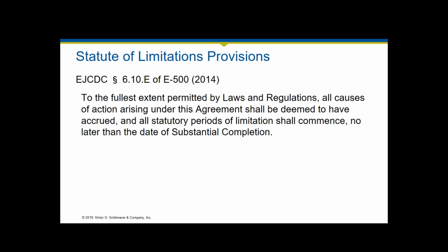Looking at both the AIA standard contract and the EJCDC documents, they have this type of provision. At least the AIA used to have it, the EJCDC still has it: all causes of action arising under this agreement shall be deemed to have accrued, and all statutory periods of limitation shall commence no later than the date of substantial completion.